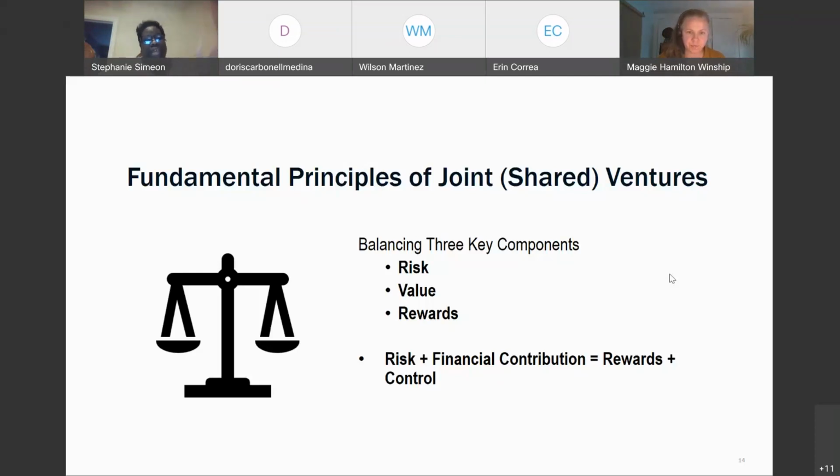If you're the sole development coming into that community and it has been neglected for the last 20 years, your return on investment is going to be very low in the beginning. You're going to have to do supplemental development, small scale things around that development to support that market. The developer or financial partner, the person making this financial contribution, has to be a believer in the process because it's not going to show a high return on investment right away.